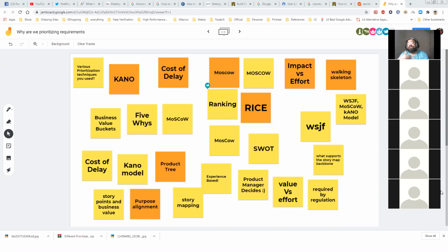That is where your other methods like WSJF, Kano, sorry, not Kano, this one, value versus effort, your RICE, all those things will come and impact. If I put RICE, what is the reach of the support team's request? It will be very small because it's an internal team, but the sales team will be higher. So there you will have a better understanding about your own feature that you're asking. That's how we typically do it.